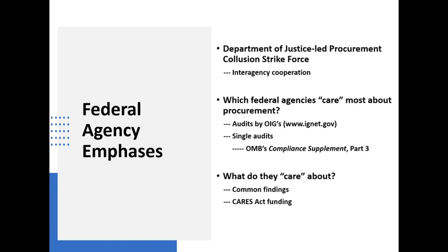As far as identifying the amounts that you may be in a position to spend, one of the things I didn't mention in fashioning the solicitation is to say to the marketplace that you reserve the right not to place a contract at all. In other words, to decide that based on the offers you received, you don't have enough money to do it. That's a right you ought to have preserved in your solicitation.